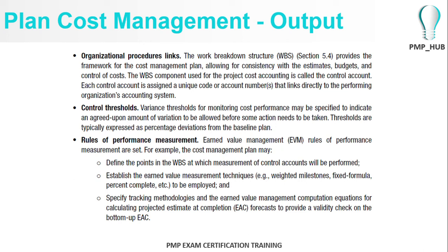Say, for example, for user training. Maybe your project is a $1 million project, but for user training, each subpart has a small budget allocated, and then you track. For UAT training, this is the actual expense that you have incurred for resources, food and transport, booking rooms, projectors and other equipment. This is the actual cost you have incurred against the amount allocated for training within the overall massive budget. So the day you find there is an issue and you have overrun your cost, if you identify it like that, you will have a better explanation.